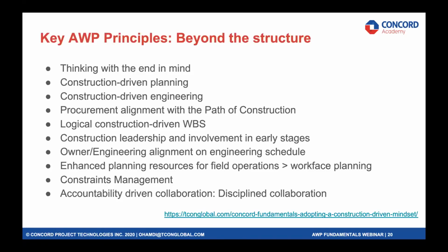Definitely your work breakdown structure needs to be aligned with the logical construction-driven philosophy. And so it's not a good idea to keep a numbering structure that doesn't fit with the advanced work packaging numbering structure. You need to align both and adopt one single work breakdown structure for the project. Other elements that are associated with the principles are constraints management. Definitely, that's a key practice.